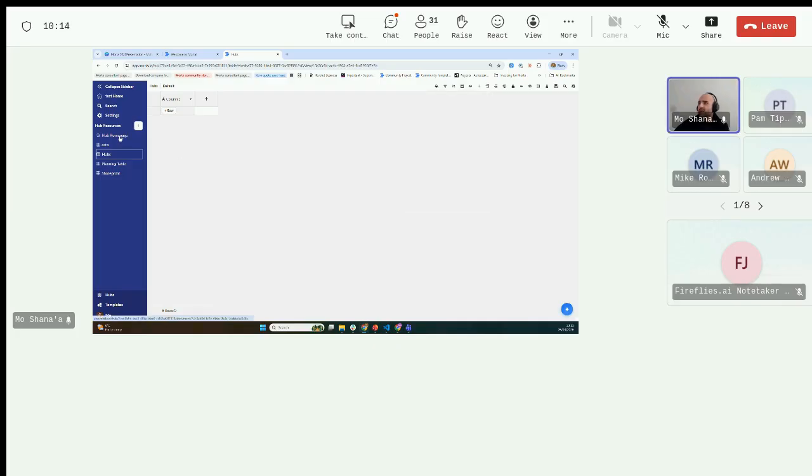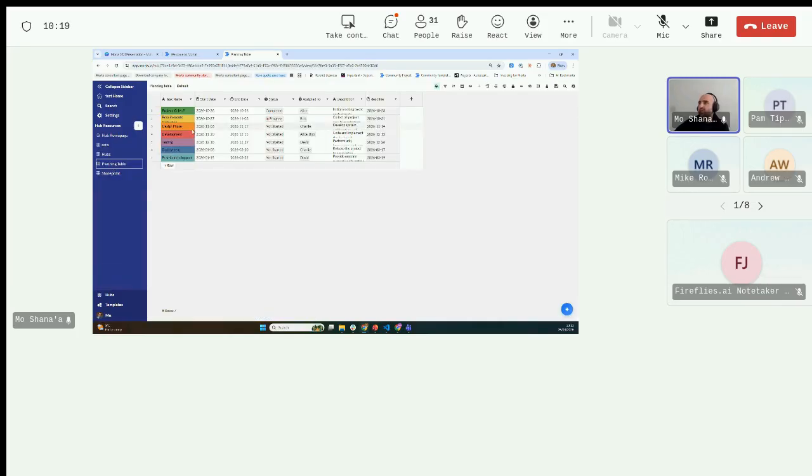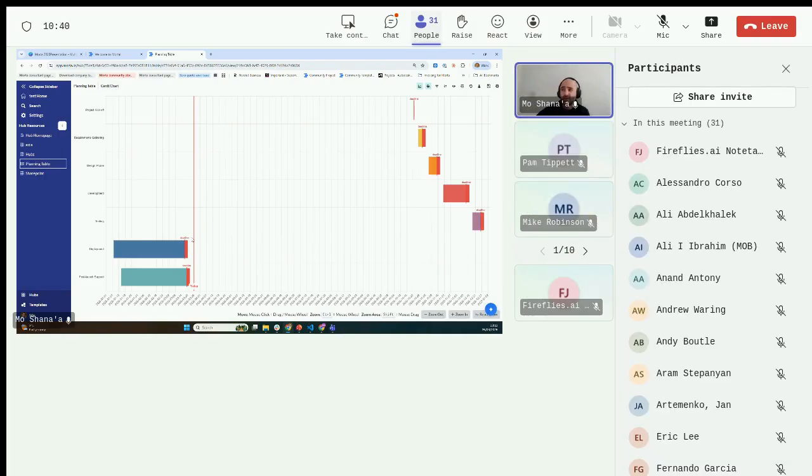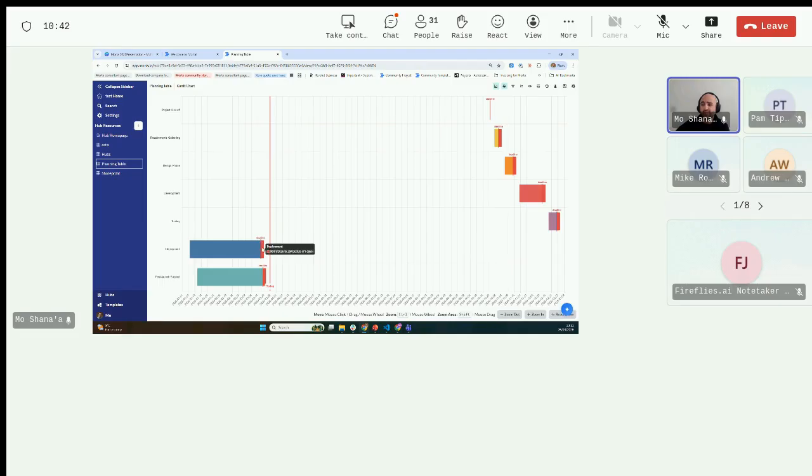And I think the last one that I wanted to highlight for the time being is an addition we've made off the back of feedback that we got from Megan. So let's say we have an activity where the actual date is later than the deadline. That then highlights in red, and I can see the delay effectively on my Gantt chart.